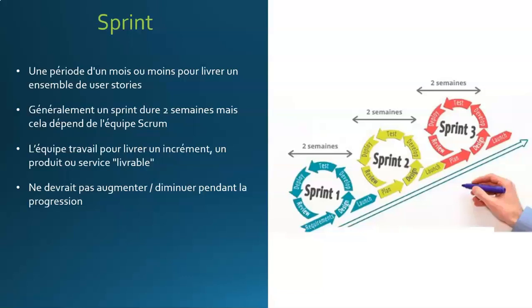However, keep in mind that Agile Scrum is flexible, so if you find that 2 weeks is too short for your team, then you can adjust your sprint. If you start with 2 weeks and you realize that it's too short, you can lengthen the sprint. Start with 3 weeks, but continue with 3 weeks in each sprint. Remember that the goal of Scrum is to continuously improve. So if something doesn't work, don't continue.